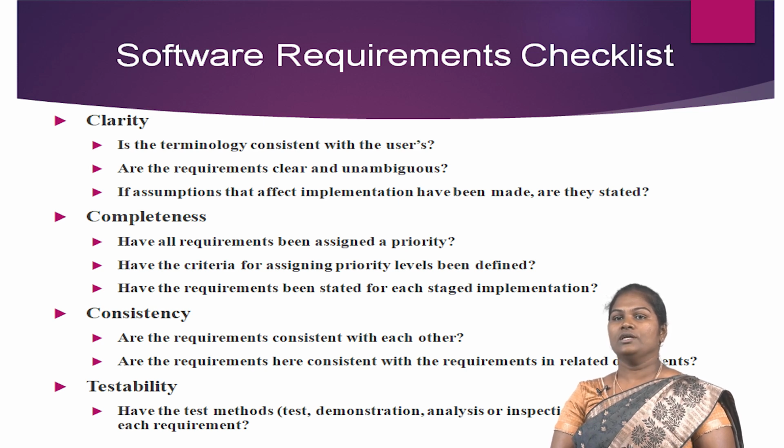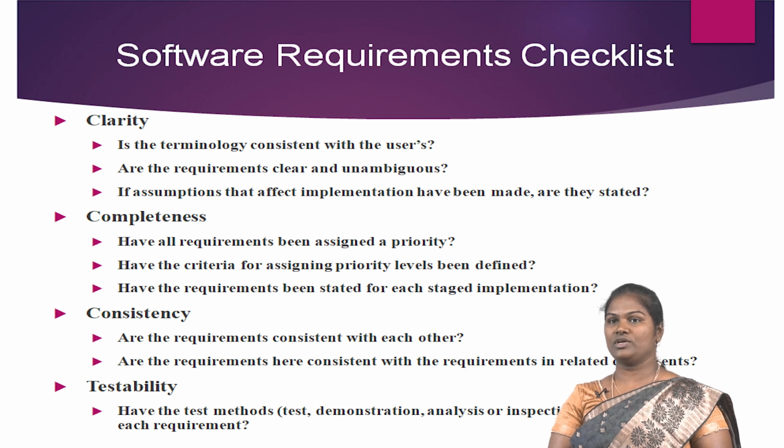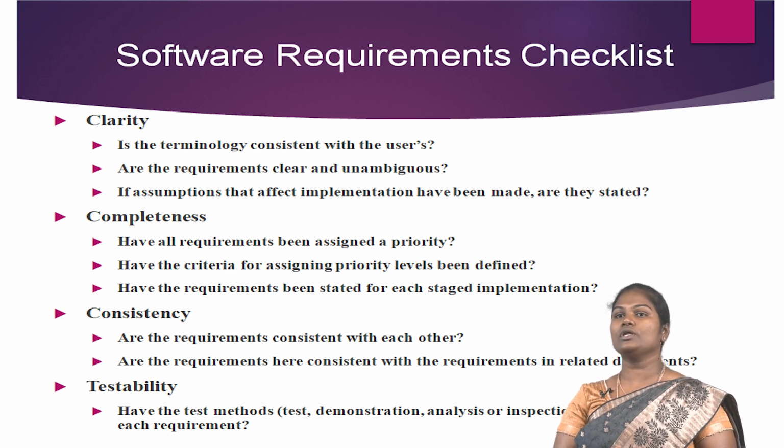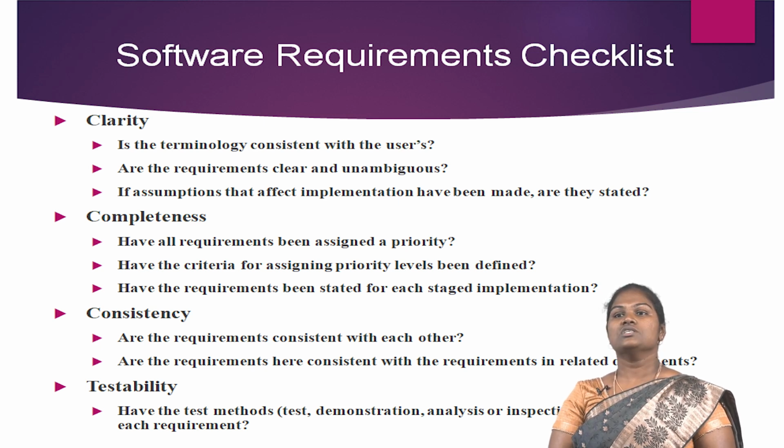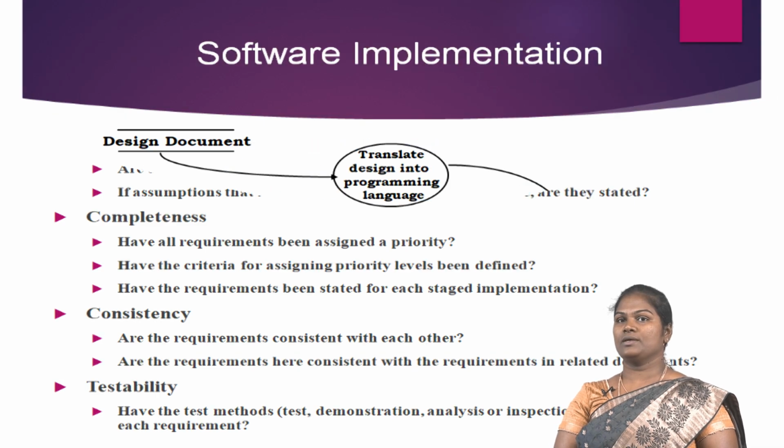Any problems discovered during the review or formal inspection of the software requirements document would be recorded in a trouble report, and corrective actions would be performed before the requirements are considered complete. This list shows a small subset of questions asked during the formal inspection of the software requirement documents.